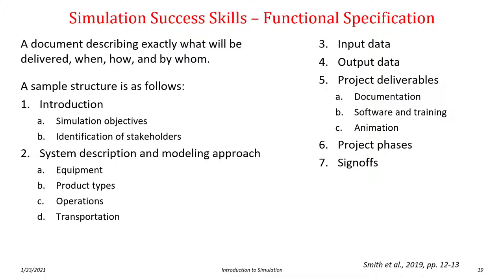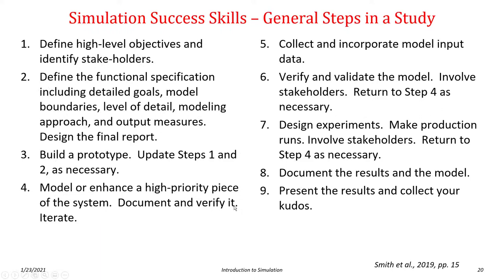Finally, project deliverables: documentation, software and training, animation and so on. So what will actually be handed off once the project is finished? And then planning project phases, so what is the sequence of tasks that will be done, and milestones and so on. And then finally sign-offs, the agreement that the project is complete. You don't need to be locked into this specific structure, but the important part is to have a document where the stakeholders and the simulation team agree on what's going to be done, what's available, and so on.